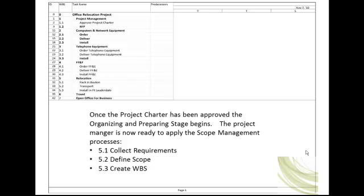During the starting stage of the project, the project manager applied similar processes to develop the project charter. During the organizing and preparing stage, the project manager further defines and adds details to the charter and eventually produces the project management plan. The project manager begins by collecting requirements or more information pertaining to the project scope. Tools and techniques used include interviewing stakeholders, brainstorming, panel discussions, focus groups, and surveys. The project manager then analyzes the requirements and defines scope by developing a project scope statement.